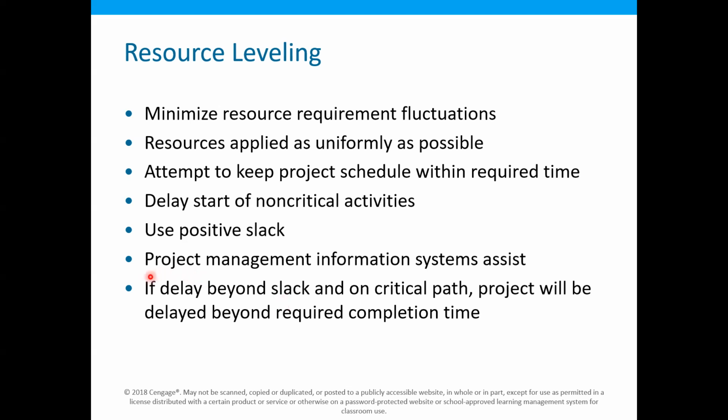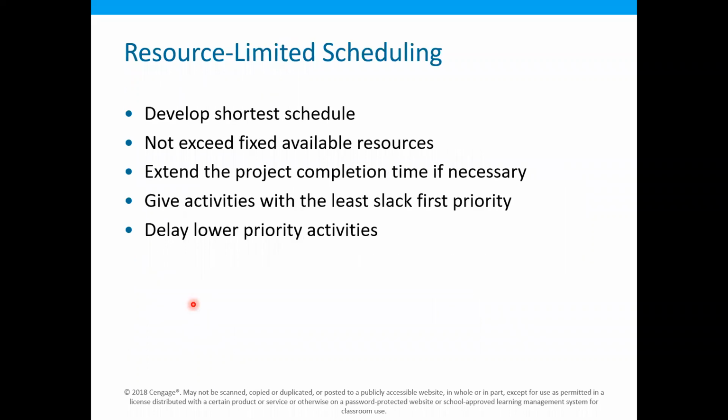So this last step means that sometimes it is not 100% possible to completely level the resources without delaying the duration of the project. In those situations, the resources are very much limited on the project, and then the delay on the activities of the project is inevitable. Okay, so let's see it with the help of the example.